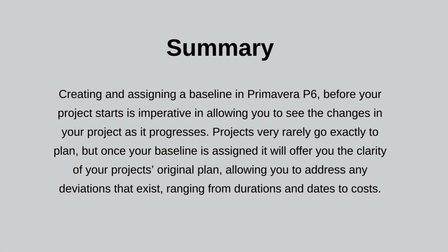Summary. Creating and assigning a baseline in Primavera P6 before your project starts is imperative in allowing you to see the changes in your project as it progresses. Projects very rarely go exactly to plan, but once your baseline is assigned, it will offer you the clarity of your project's original plan, allowing you to address any deviations that exist, ranging from durations and dates to costs.